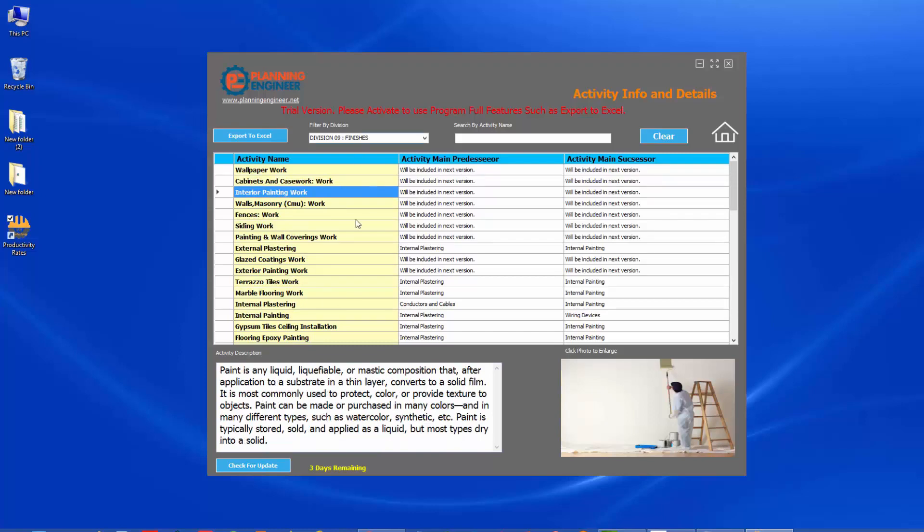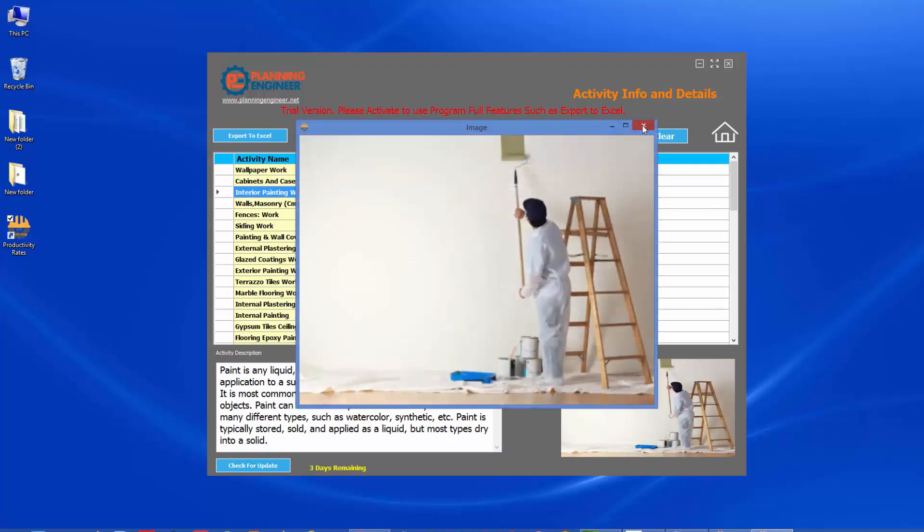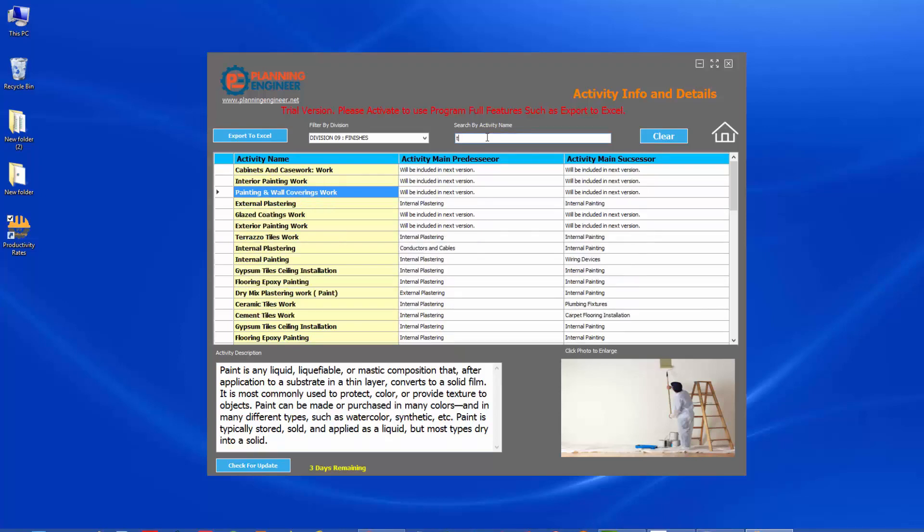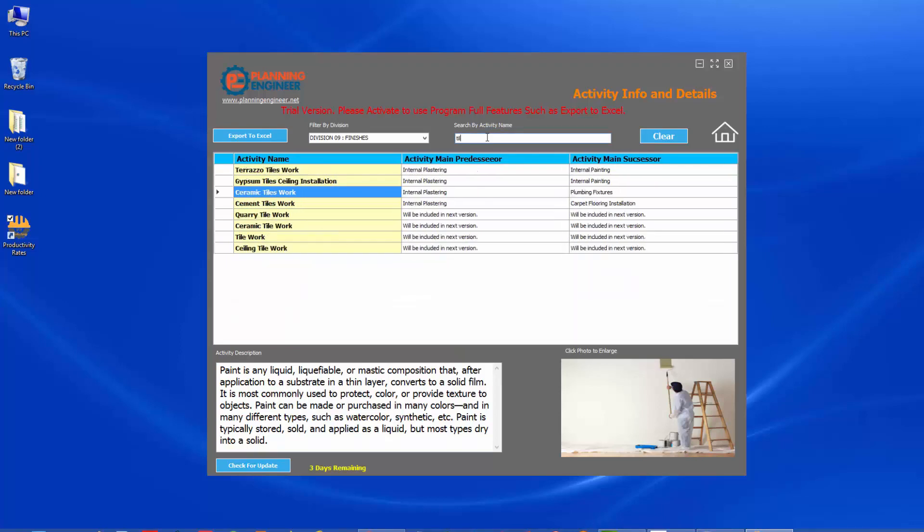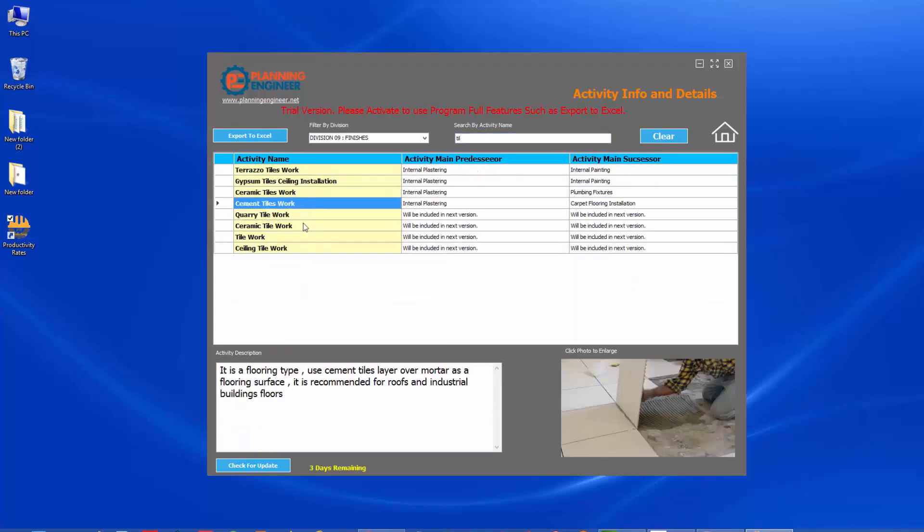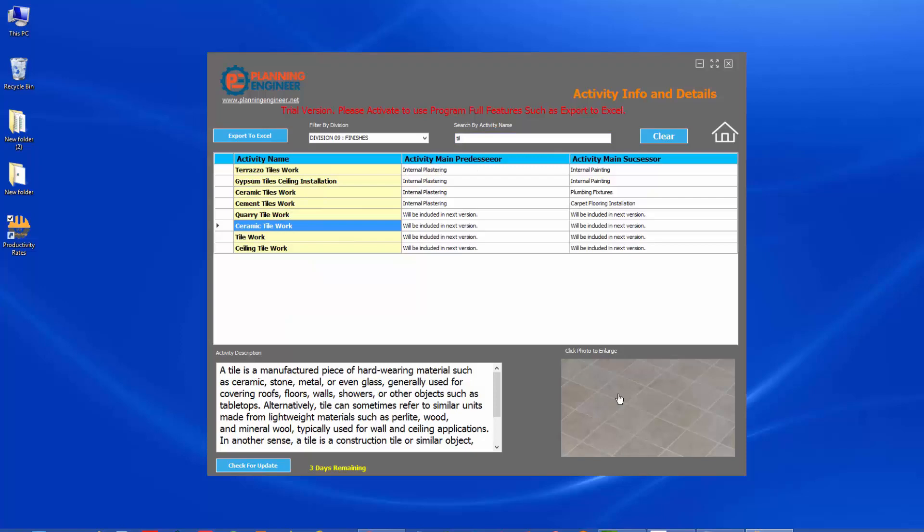According to the division of work, you can enlarge any photo of course, and you can even search. Like if we are searching for tiles, we can just type tiles and you'll find the ceramic tiles. This is very important for people who are looking for definition or good definition for some activities they don't know. Also, we are populating here the activity main predecessor and main successor. So it will give you a very good idea about planning when you are sequencing the activities, what is before and what is after.